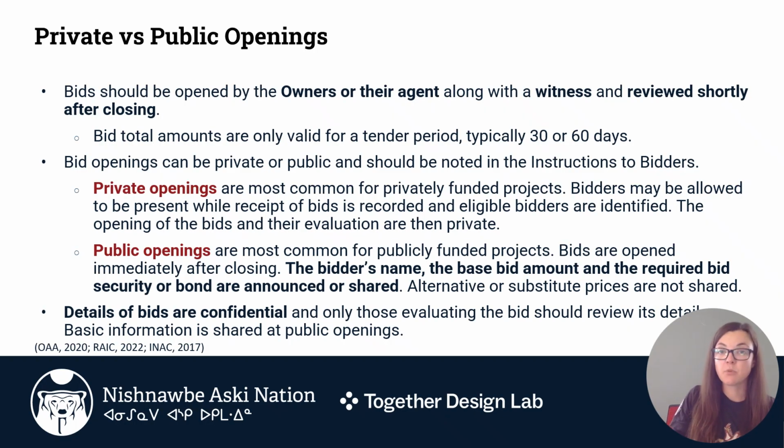Usually, for housing projects, such as CMHC funded Section 95 projects, you would not have a public opening. But for larger infrastructure projects, such as water treatment plants and schools, government funding may require or encourage a public opening of the bids to ensure maximum transparency.